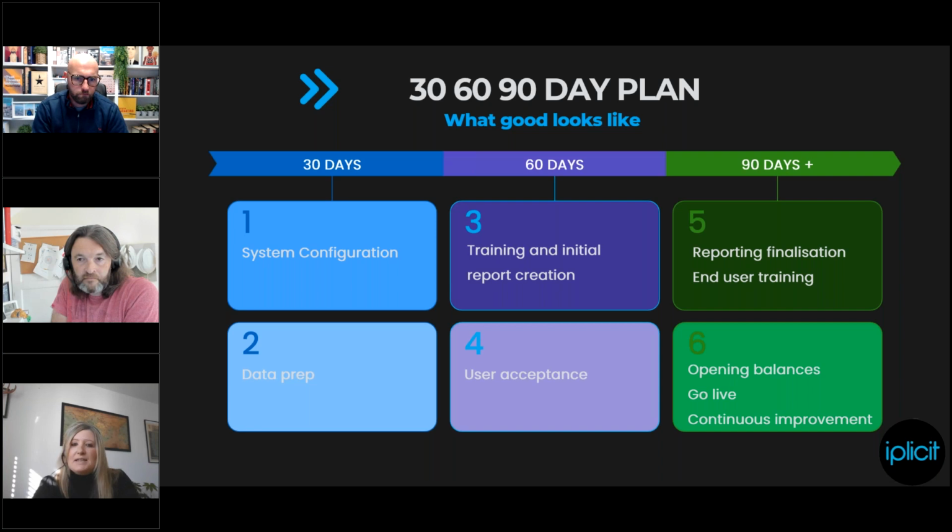And then probably towards the end of that middle month, we would encourage that user acceptance testing, at least 2 weeks. Not consecutive, but at least a good chunk of your time you need to put the system through its paces, and test things, and test even down to stationery layouts. That's one of the really biggest things that people forget to say, oh yeah, I like that invoice layout and that remittance advice is great. Guaranteed someone goes live, oh, that's not what I wanted. That's not what I wanted.